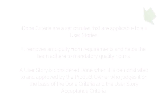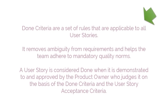Done Criteria are a set of rules that are applicable to all user stories. They remove ambiguity from requirements and help the team adhere to mandatory quality norms. A user story is considered done when it is demonstrated to and approved by the product owner, who judges it on the basis of the done criteria and the user story acceptance criteria.